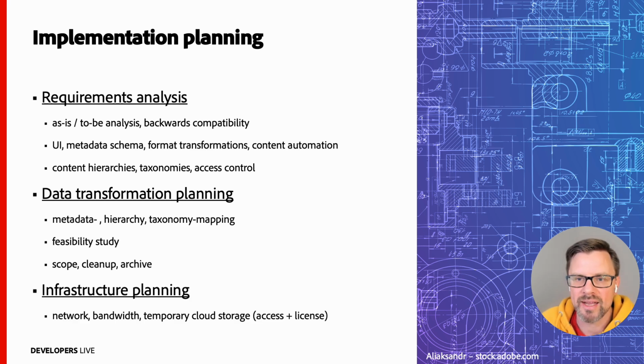Don't forget to plan and analyze the infrastructure. What bandwidth and protocols are available on the legacy system to extract the data, and how long does it take to extract the data? Also, measure ahead of time how long it takes to upload the data to AEM.